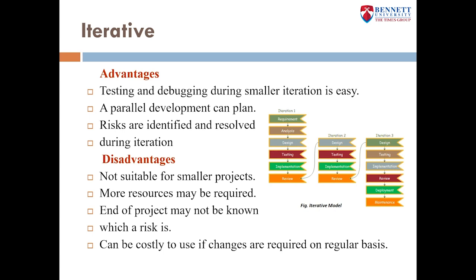Now some of its disadvantages are it is not suitable for smaller projects. More resources may be required. Design can be changed again and again because of imperfect requirements. Requirement changes can cause the project to go over budget, and the project completion date cannot be confirmed because of changing requirements.